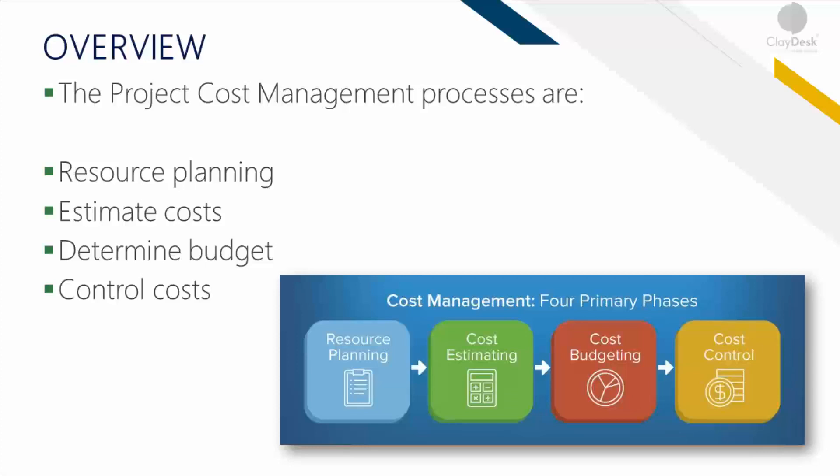Second is estimating costs, which is the process of developing an approximation of the monetary resources needed to complete project work. Next is determining the budget itself, which is the process of aggregating the estimated costs of individual activities or work packages to establish an authorized cost baseline. And then finally, controlling those costs, which is the process of monitoring the status.